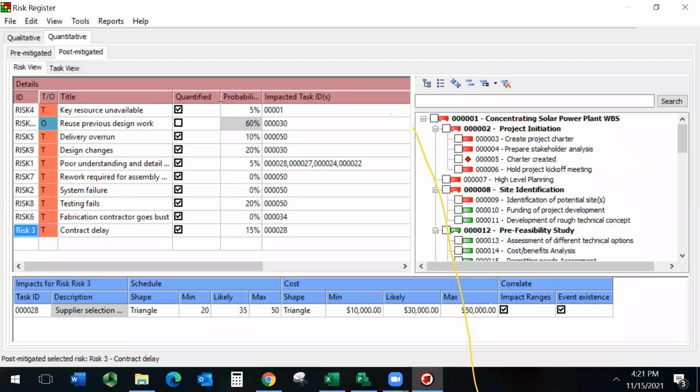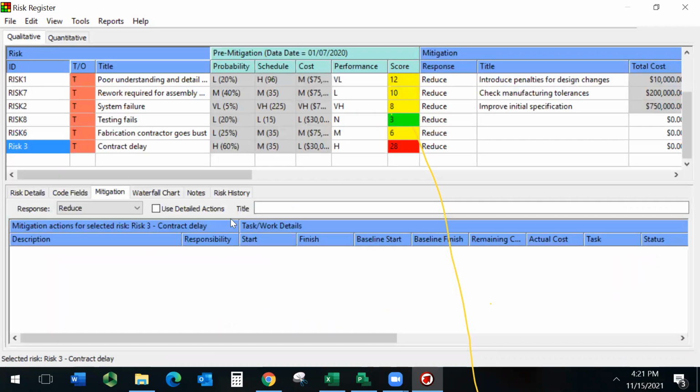That's us. Okay, so what is it we didn't do and I didn't talk about before? Remember, you can edit the risk scoring. That's something that you need to remember. You can quantify the risk impact by adding money, right? But you have to do it in the quantitative sections.